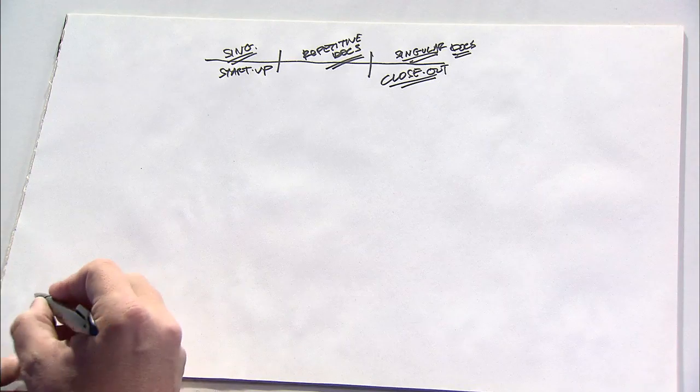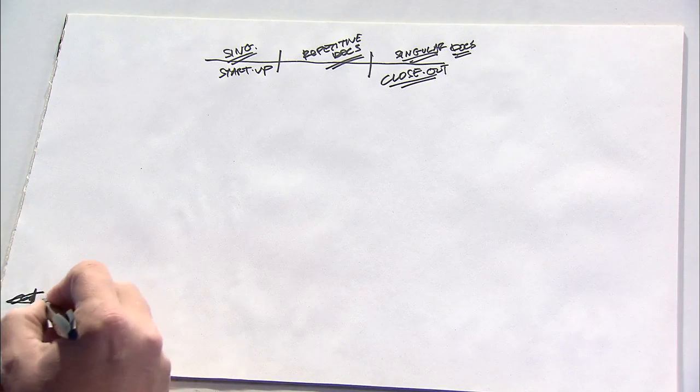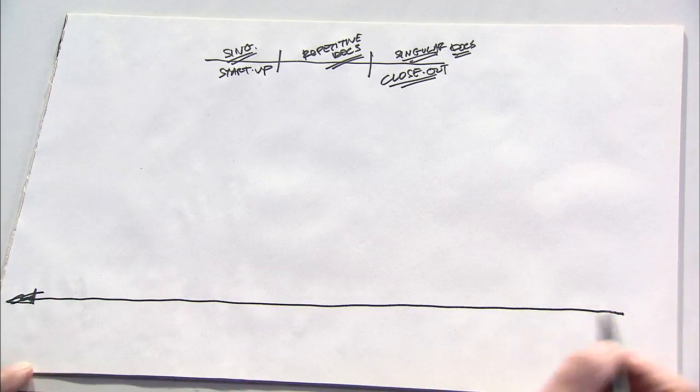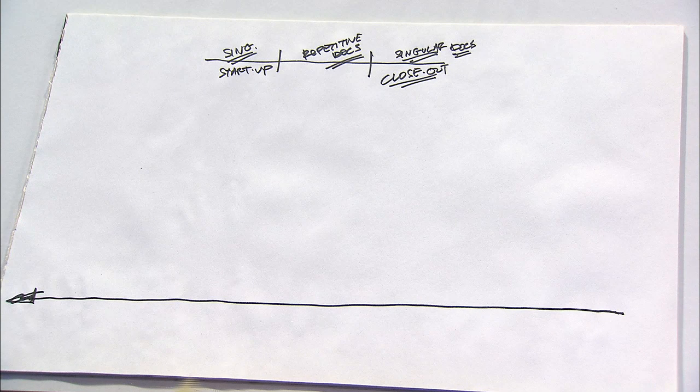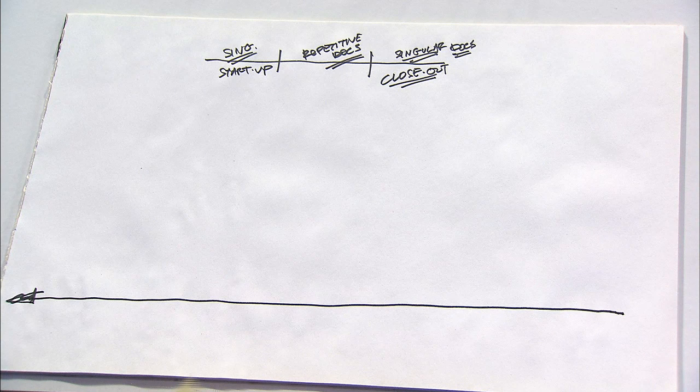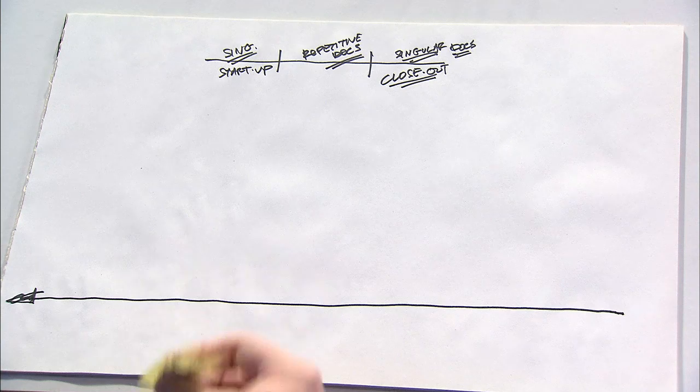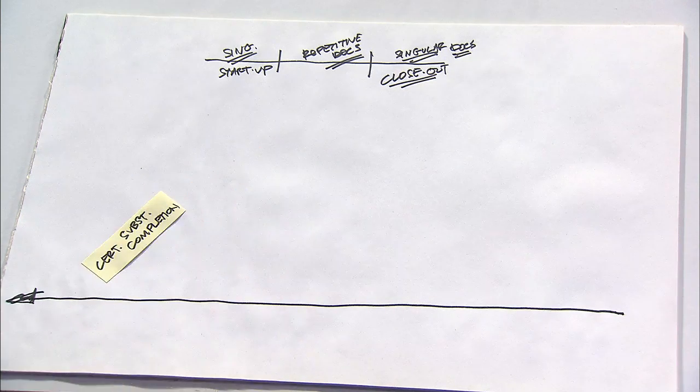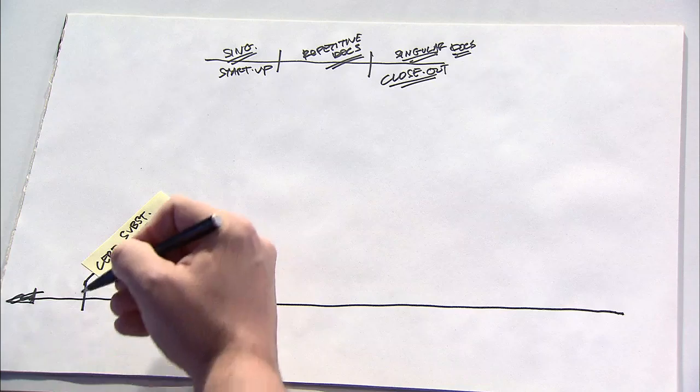So let's recreate our timeline at a larger scale, this arrow representing that this is the back end of the job. And in the closeout phase, the document and event that occurs around which most of the other things revolve is the issuance of a Certificate of Substantial Completion.